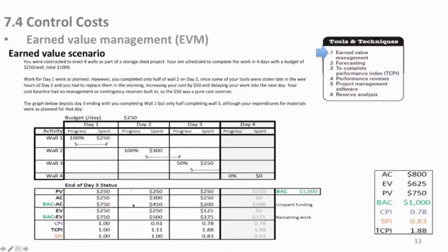Here's a calculation that we're going to need, not directly in this scenario, but in detail. We'll need that later on in the slides coming up. But first, the balance at completion, which is $1,000, minus the actual cost of $250, is $750. So you just calculate that out, and you'll find that at the end we have yet $250 remaining in the budget. And why? Because we spent $50 more than we needed. So we're short $50 basically on day 4.